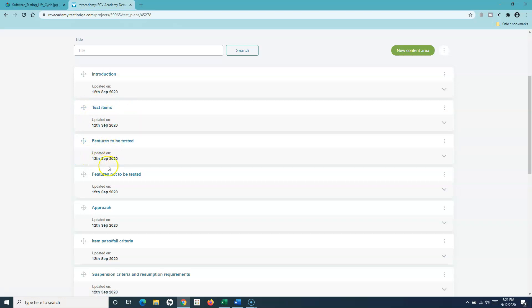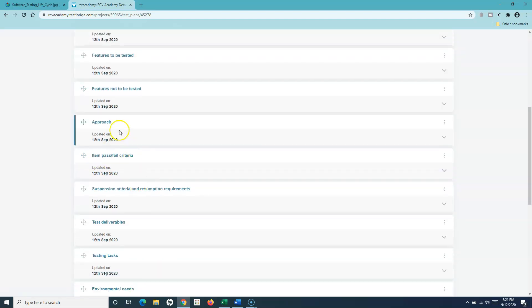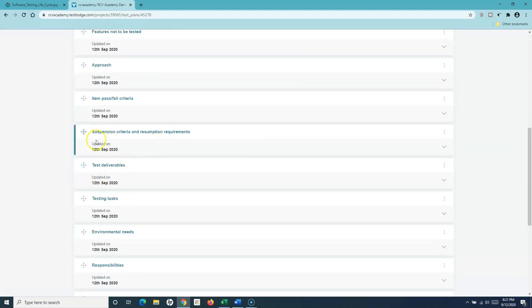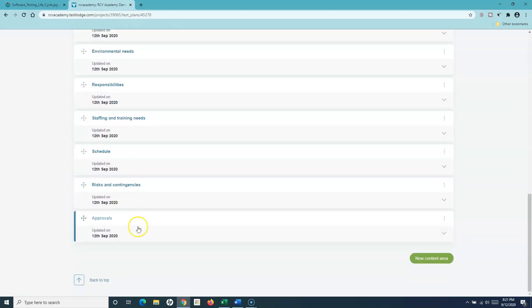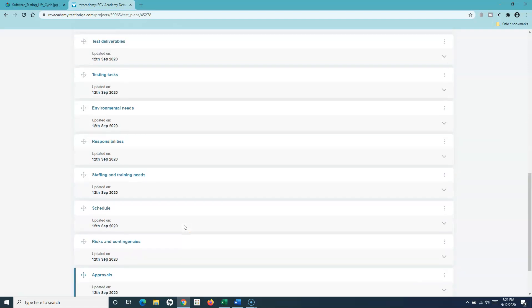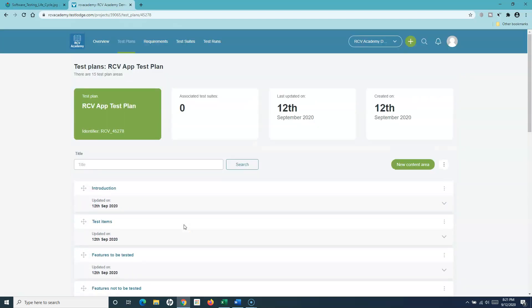The test plan document also covers what features need to be tested, what features don't need to be tested, and what the approach of testing is — which goes into the approach section. Then you have pass/fail criteria, suspension and resumption criteria for testing, and many more sections around deliverables and tasks. All of this is captured and provided to you when you create the test plan template in TestLodge.